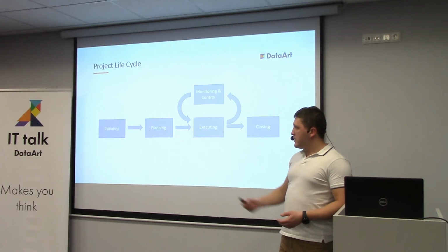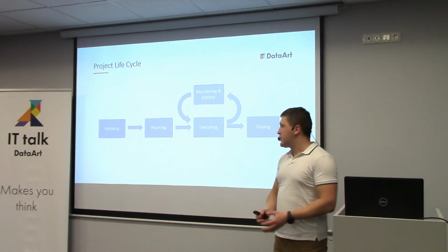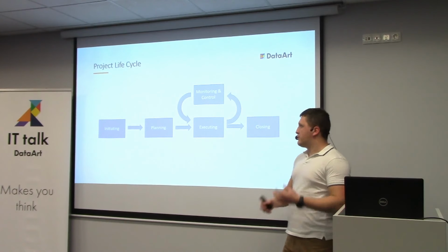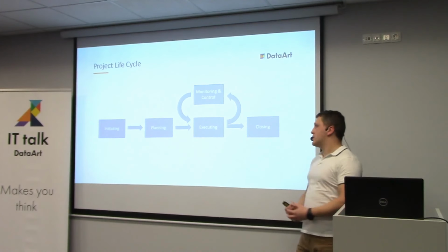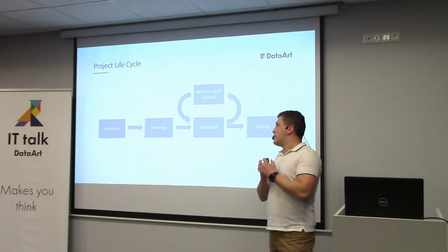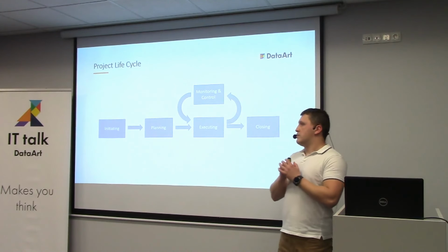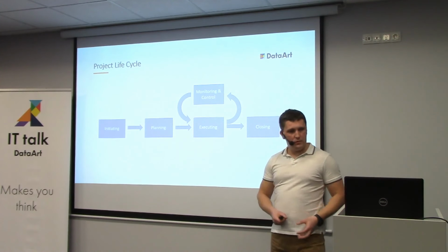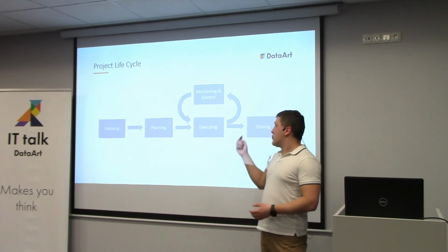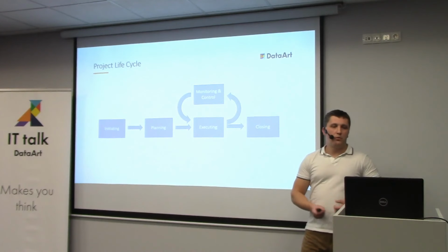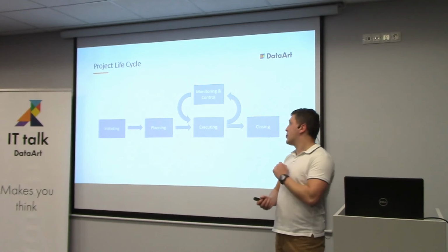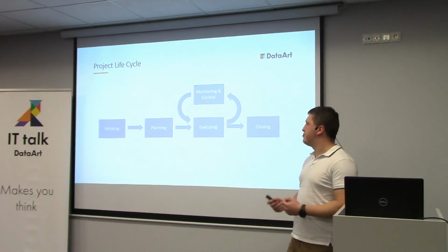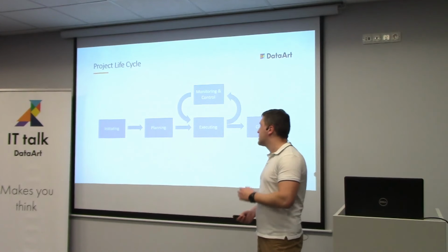It begins with initiating, where we do all the preparation for project starting. Planning, where we arrange items that we need to perform, work items, what we need to do, put it on a schedule, assign it to developers. Then we start executing, where we write code, actually. In parallel with that is monitoring and control, where we test our code, where we check status, gather for all those very useful meetings, etc.